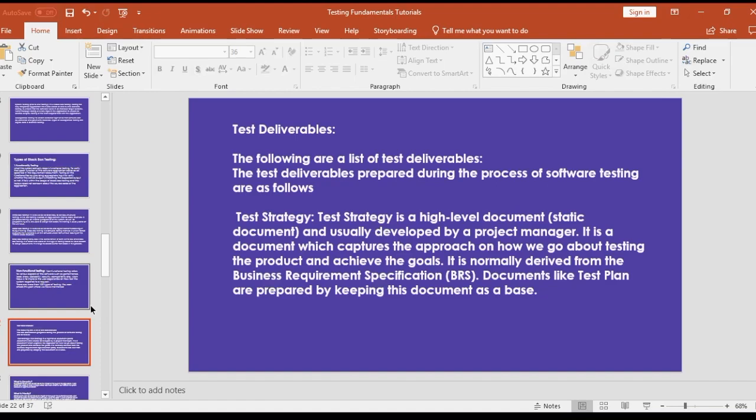You would have planned that this person is fixing any defect raised within this functional area, depending on how big your system is. Say, for example, I'm testing my car: any defect that I find, anything wrong with the engine, I will direct that to Mr. John. Anything wrong with the wheels goes to Mr. Lancome.